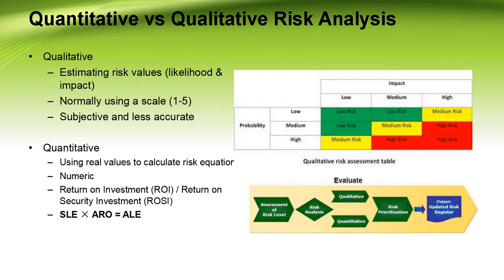Uncertainty is also estimated, allowing for relative projections of qualitative risk for each threat based on its position in your risk matrix that plots probability, very low to very high, and impact, very low to very high. Numeric values can be assigned to each state: very low equal to 1, low equal to 2, moderate equal to 3, and so on. This is just an example I'm giving. To perform a qualitative analysis, because the categories are subjectively assigned, the result remains qualitative.